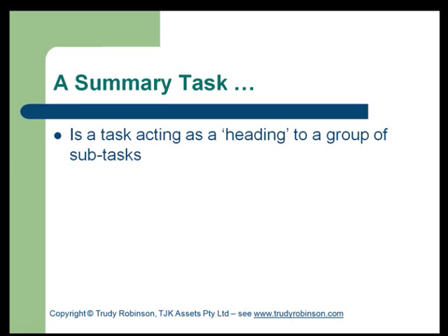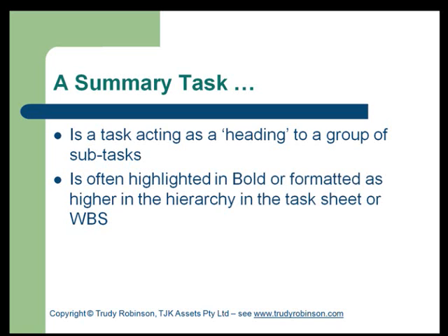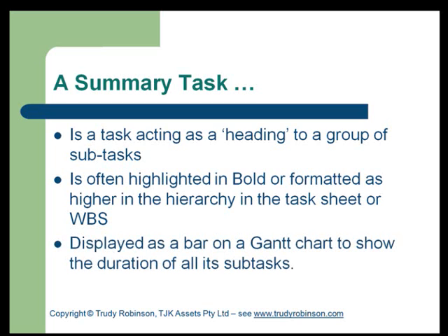A summary task in any project management software package relates to the heading or a grouping of subtasks. The formatting of this heading task or summary task is often bold, or it's formatted to show that it is higher in the hierarchy in the task sheet or the work breakdown structure. This is something that you may choose to do manually, or it might be automated once a task has subtasks. A summary task may be displayed as a bar on a Gantt chart to show the beginning date to the end date of all its subtasks.